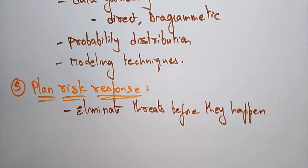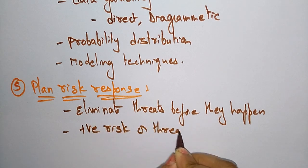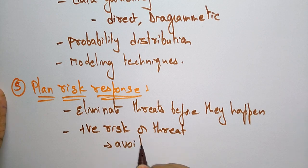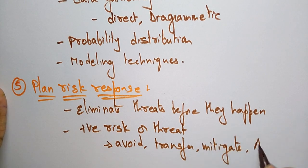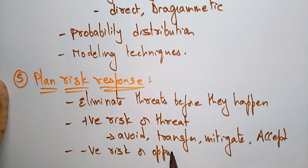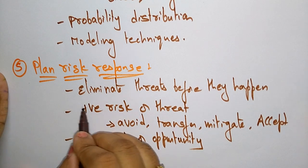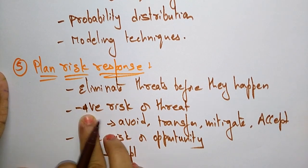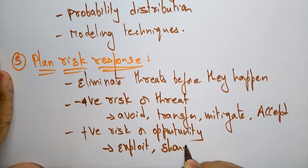For a positive risk or threat, the strategies are: avoid, transfer, mitigate, or accept. For a negative risk or opportunity, the strategies are: exploit, share, and enhance. So plan risk response covers both types — threats are handled through avoidance or mitigation, while opportunities are handled through exploiting or sharing them.